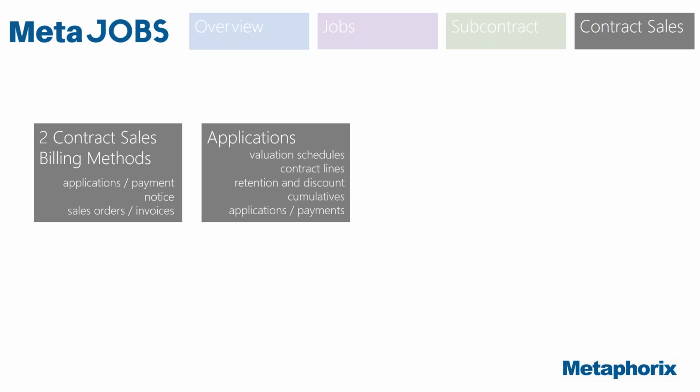In there, you can set up your variation schedules, and what they are is like the roadmap of when you're expecting applications to be made to your customer. So it's a bit like, I suppose, a broad brush, quite basic cash flow for the project. If you've got when you're expecting the applications to go on, you can derive really when you're expecting payments to come through for those particular projects as well.